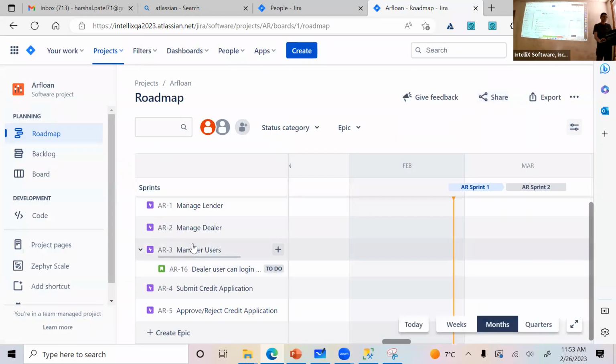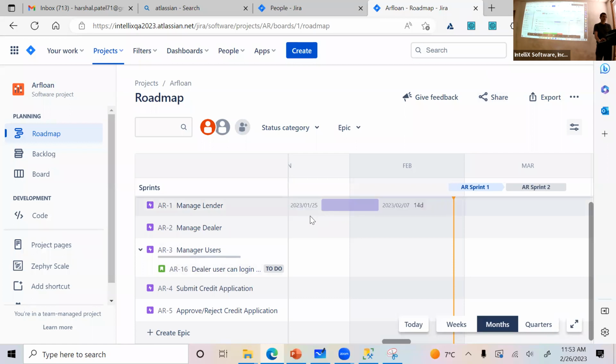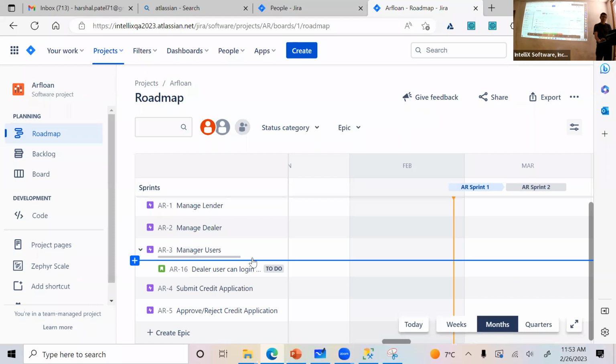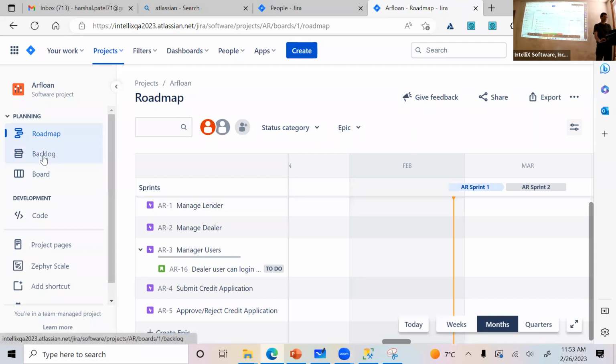It's essentially about what you are more comfortable with and what level of detail you want to put into it. An epic is a higher level construct, more like a module, a grouping of the stories or requirements. In some corporations, you will see an even higher level called initiative, which spans multiple epics. The sprint is a group of work assigned for some time period, like a 2-week time window. Remember, it's a 2-week sprint, that's how we have defined it. Your board is going to show you what is available in 2 weeks, and the backlog is going to show you everything that's available for your product.